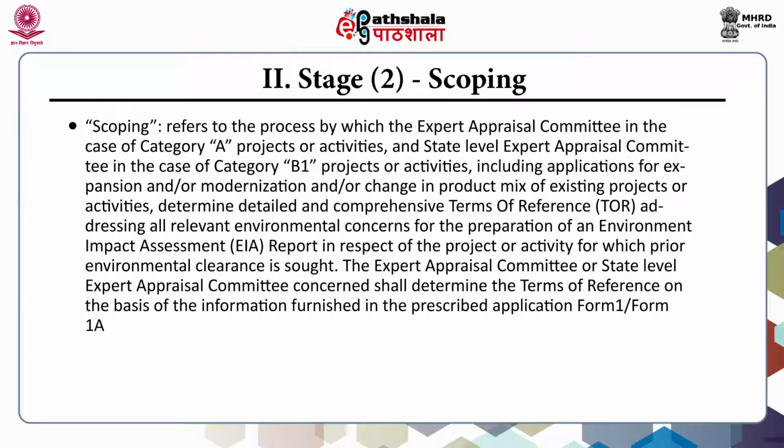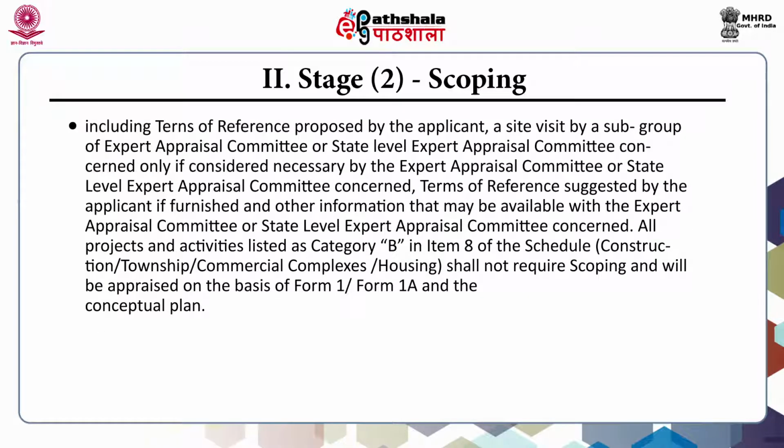The expert appraisal committee or state level expert appraisal committee concerned shall determine the terms of reference on the basis of the information furnished in the prescribed application form 1 or 1A, including terms of reference proposed by the applicant.